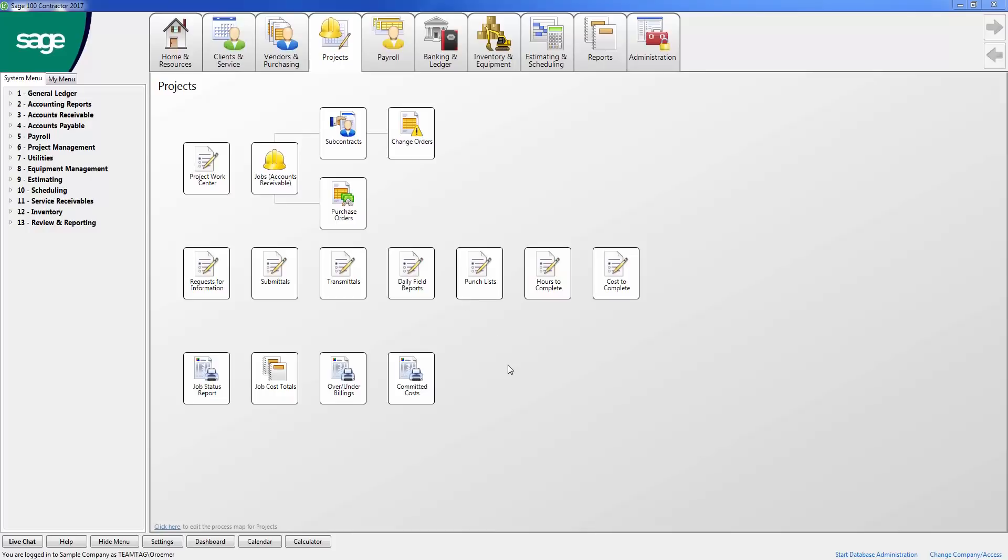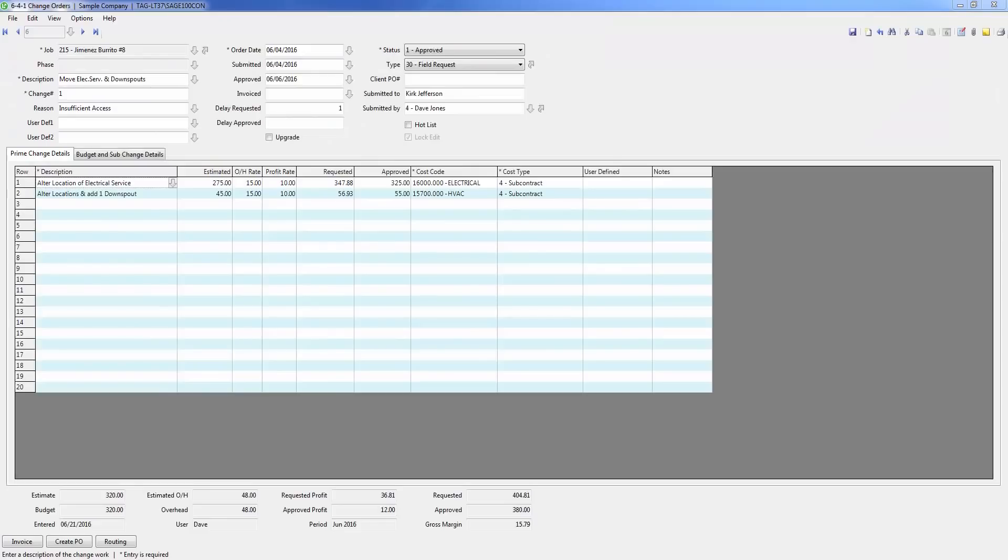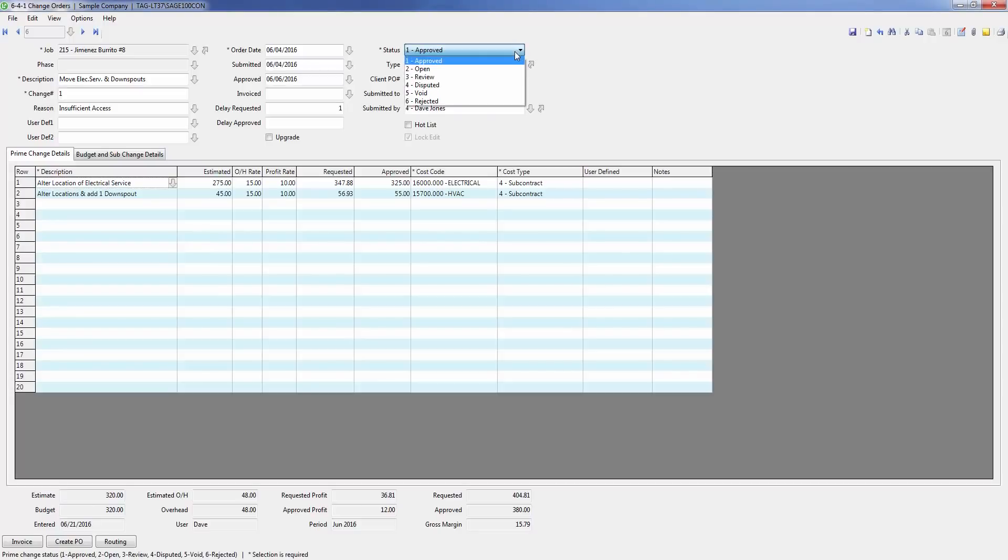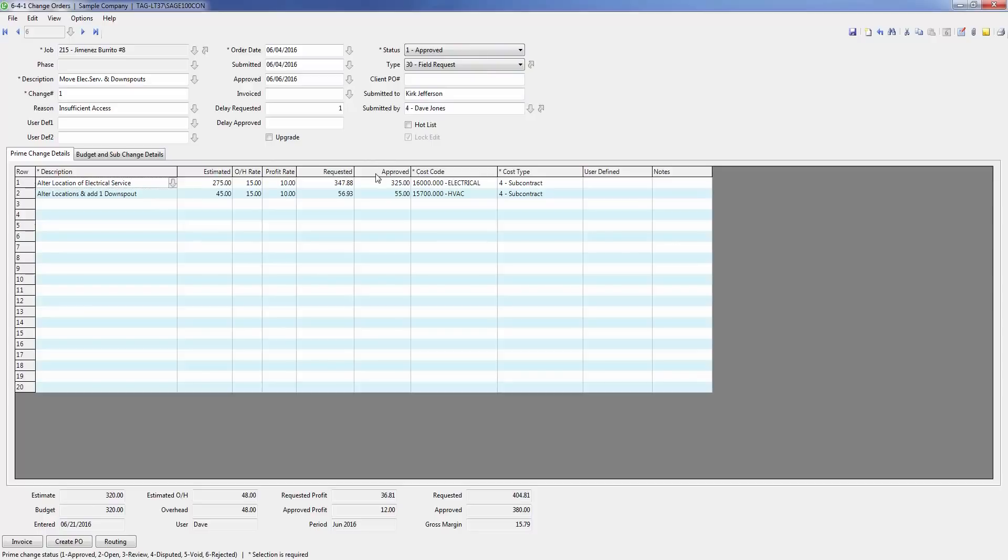Within the project management module, you can also create your change orders. Let's take a look at the change order screen. As you can see here, you can enter, track, and manage changes to your prime contract, budget, purchase orders, and subcontract agreements, or all of the above. In this screen, you can track the status of the change order, various approval and submission dates, as well as the requested and approved amount of your prime contract change orders.